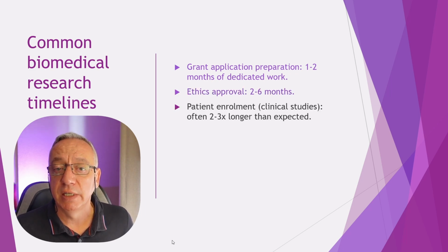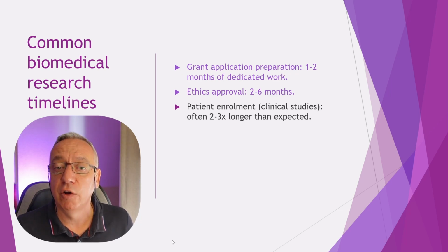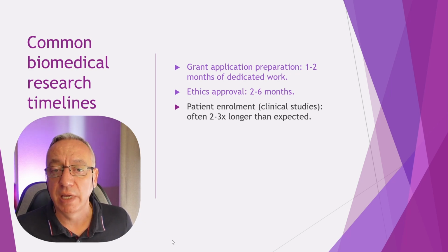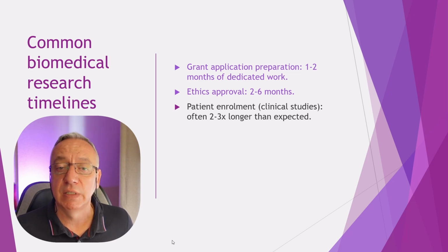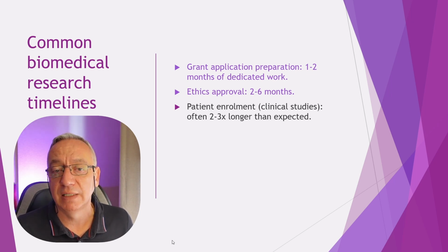Patient enrollment in clinical studies: think about a period of time and multiply it by 2 or 3. Here it all depends on your previous experience in the field. Are you already working with the community from which you are trying to recruit? Have you worked with or set up a community advisory board? If you are completely new to the situation and the settings, it might take longer than you think. If you're already involved with the people, it will probably go faster.